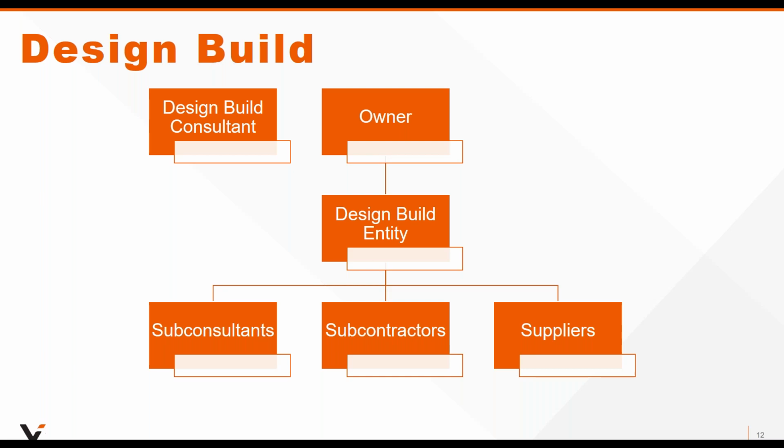That design build entity then prepares a bid based on those bridging documents, and engages with specialists, suppliers, subcontractors, subconsultants, as the case may be, to come up with a bid. And then based on the qualification, could be a low bid environment, it could be qualifications, or a mixture of those two, the owner selects that design build entity to go ahead and do the project.